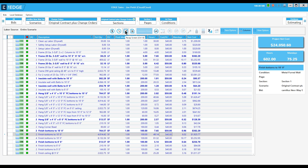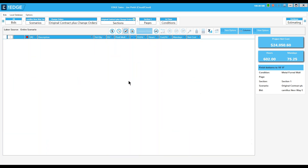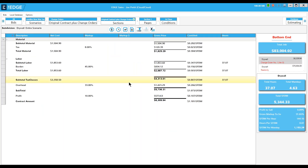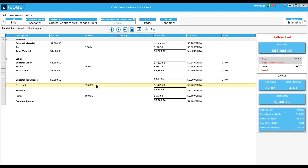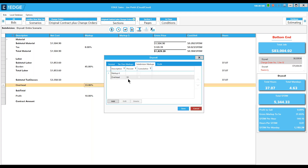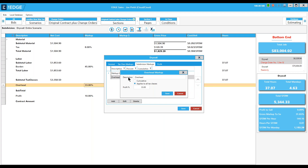Next I'll come out to the recap screen. Currently the markups shown were the markups from my original project, but I need to change them for my change order, so I come in here and make whatever adjustments I need.